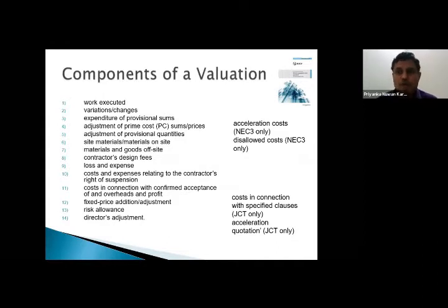Because if it is a lump sum type of contract, sometimes the quantities stipulated within the BOQ may not be correct. Therefore, it is not correctly multiplying the rate by the quantity to give the actual value of the work. Therefore, the value you are indicating there in the BOQ is a theoretical value that you need to understand.